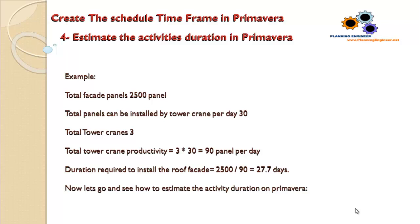Duration required to install the roof facade: 2,500 divided by 90, which is the productivity, will give us 27.7 days. So this is the minimum duration the facade can be installed, and this shows how resources or equipment can drive your duration.